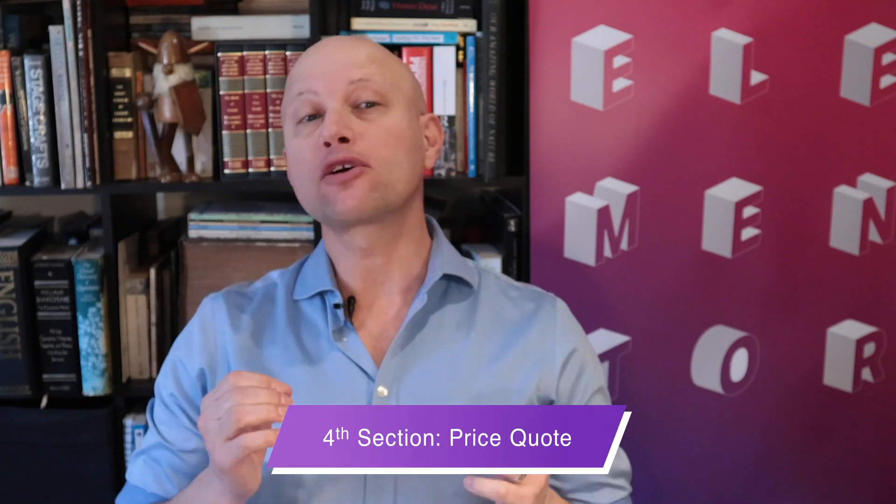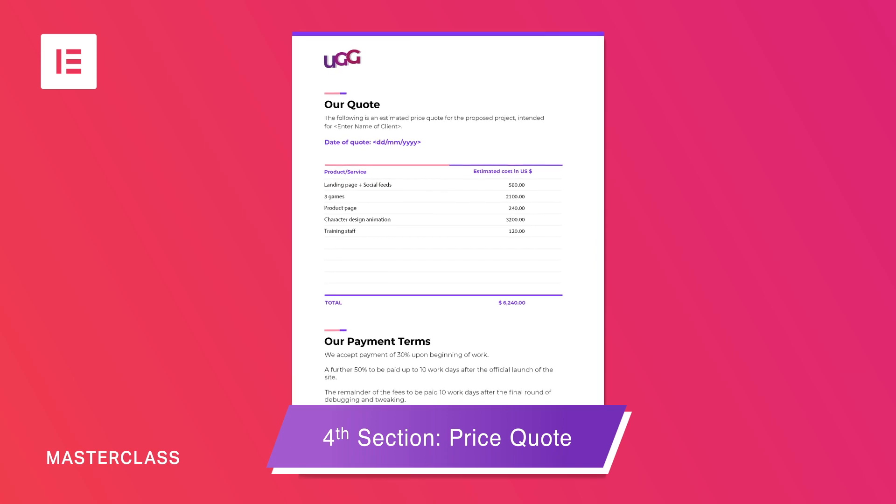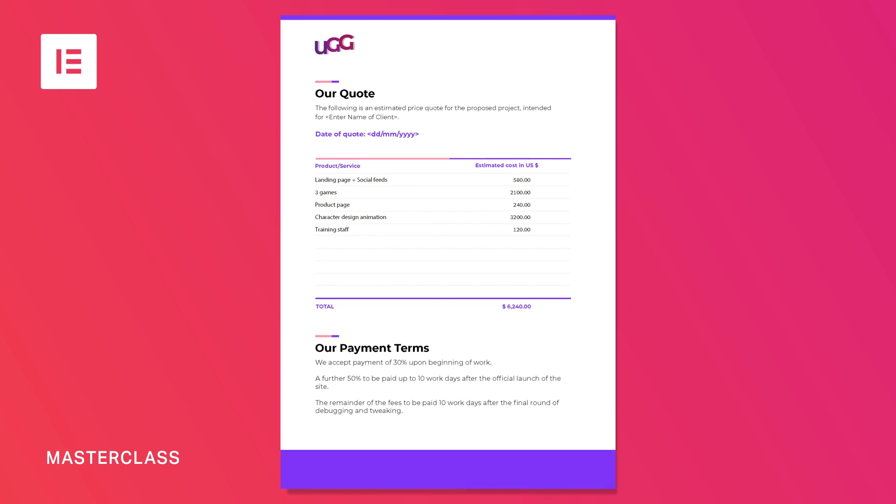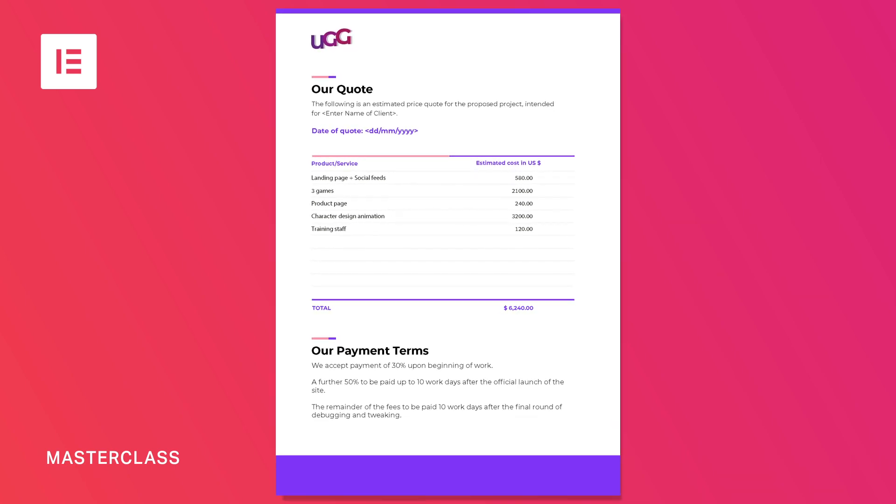We should learn from the experience of others and clarify that our schedule is dependent on all parties involved. The client, the outsourced experts — everyone must keep to the schedule if we are to deliver on time. Next comes the price quote: show a comprehensible breakdown of the costs and a total. You don't need to drill down to the level of coffee and snacks, but just enough so that the client can see that your quote is justifiable and reasonable.